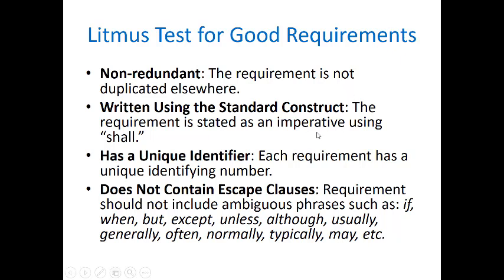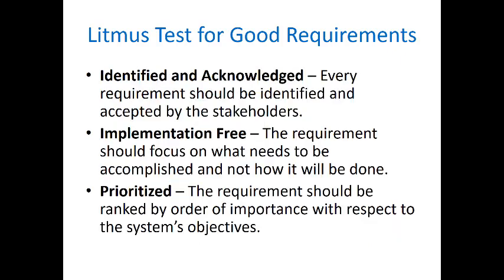And try also not to use any terms that give your designer the possibility of not implementing those requirements. For example, the system may be available 95% of the time. No, try not to use any of those terms. You have to be very specific, very to the point, very concise and precise as you specify your requirements.